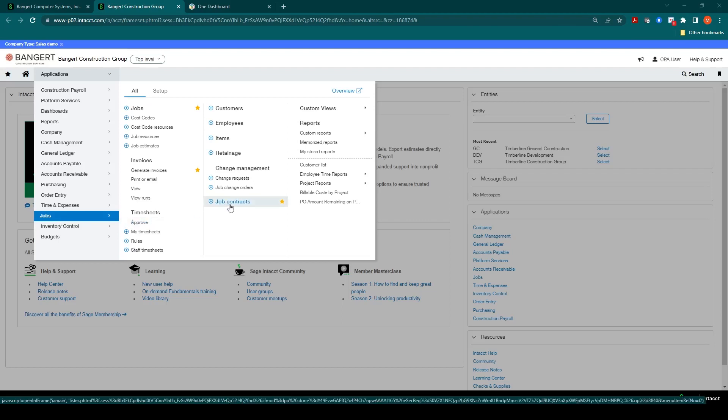Through this application, you will be able to set up job contracts. These contracts will be either based on a fixed schedule of values and can be broken out into multiple line items, or it can be set up as a time and material contract.